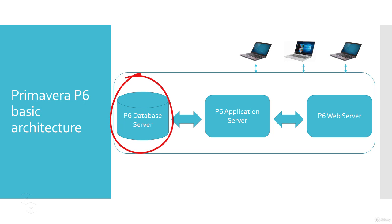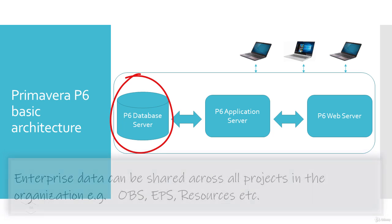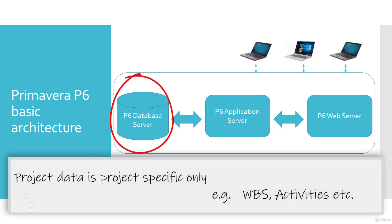Do you know the difference between project data and enterprise data? Enterprise data can be shared across all the projects in the organization. Examples of enterprise data are OBS, EPS, and resources. Project data, on the other hand, is project-specific only — it is available only for the project for which it is created. Examples of project data include work breakdown structure, or WBS, and activities.